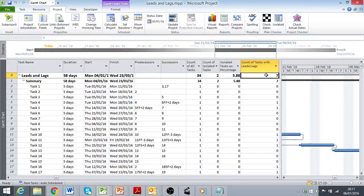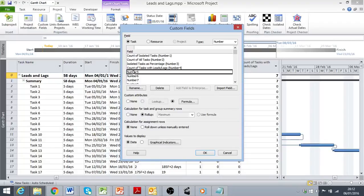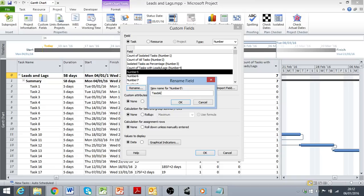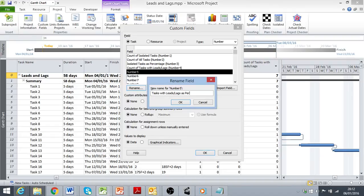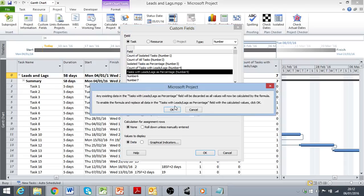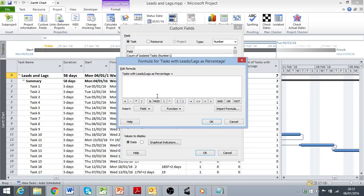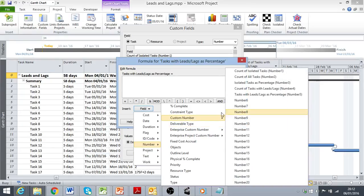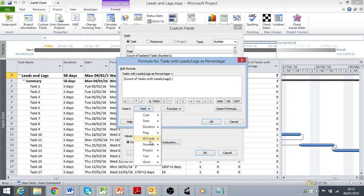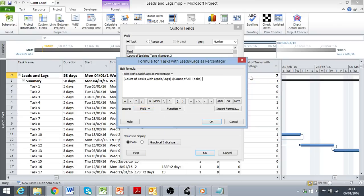The next step then is to see what percentage of the total number of tasks in the project have these leads or lags. I already have the total count of all tasks in this schedule. So all we need to do here is use one more custom field, number 5, which I will rename. And for the formula, I'm just going to take number field 4 divided by number field 2 times 100 to give me the percentage.